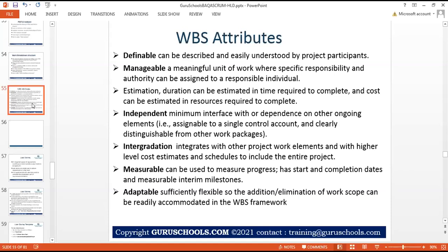As you go to a higher level, the cost estimate is basically a summary of all the work elements below them. So that's how it forms a tree structure. I can include an entire project, entire solution, entire service tree within one WBS. And then, as Deepti ma'am said, I can have each block as a separate WBS also.